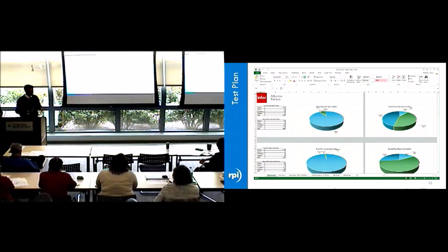From there, you might notice that our test plan has a little tab in Excel here. We have a dashboard to keep track and say, okay, in the first pass, what percent complete are we, how much has succeeded versus failed, et cetera. So we have use cases, which are like the old scenarios, like entering a journal entry or running a payroll. Those are your classic application use cases. Reporting, what custom reports do you have, what side-by-side report comparisons, your customizations or your mods and bods, your process flows, interfaces, and any extensions you have.